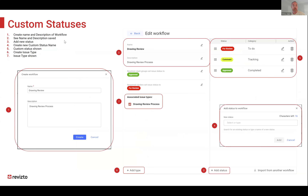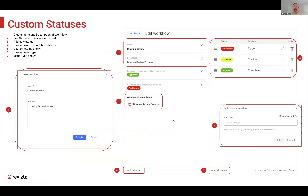When you go in and create a new custom workflow, give it a name like 'drawing review' and a description. Then you can build your statuses by clicking 'add status' at the bottom. You've got 16 characters to build each status name, so don't make it too long. Next to each status you'll see categories: to-do, tracking, and completed.